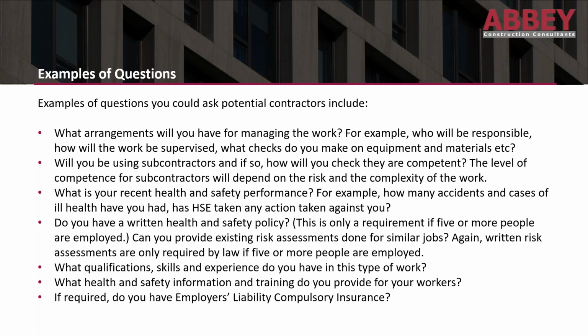What's their recent health and safety performance? So, for example, how many accidents, incidents, or cases of ill health have they had in a certain period of time, be it 3 months, 6 months, 12 months, etc.? And has the HSE taken any action against them? And remember, with the HSE, you can use the HSE's prosecution register to see if they've received any improvement, prohibition, or legal action against them.